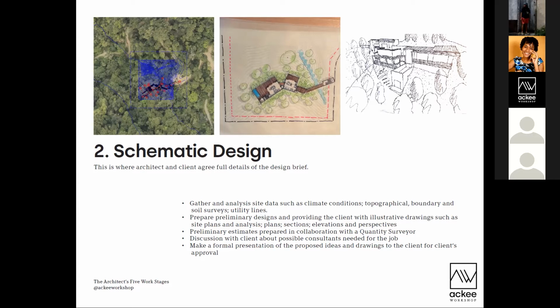And another major aspect for me that generates the design is doing your site analysis. So gathering things like climate conditions, doing topographical surveys, boundary surveys, even soil surveys, and understanding where utilities come onto the site, whether it be electricity, water, sewage, et cetera.